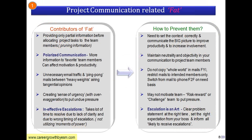Now let's get into the first factor: project communication fat. On the left side you can see the contributors to this fat and how to prevent each type. One issue is providing only partial information before allocating project tasks to team members — pruning information. Some people feel they don't need to give all the information to all team members, so they split it: first paragraph to Mr. X, second paragraph to Mr. Y, resulting in unequal information distribution.